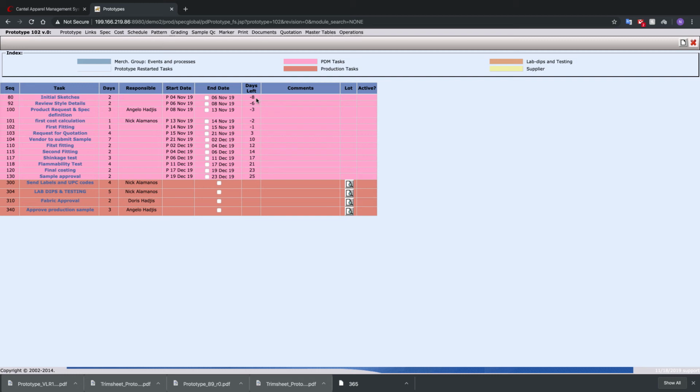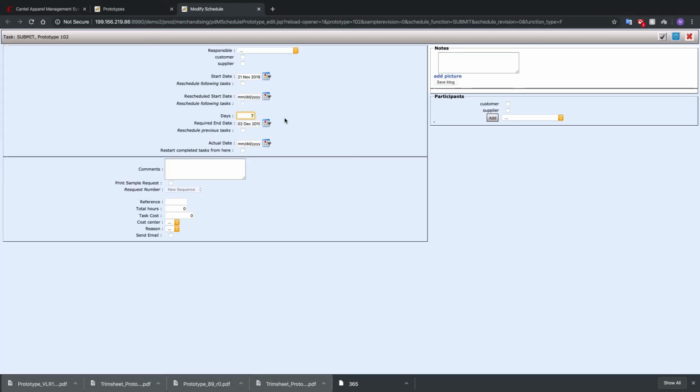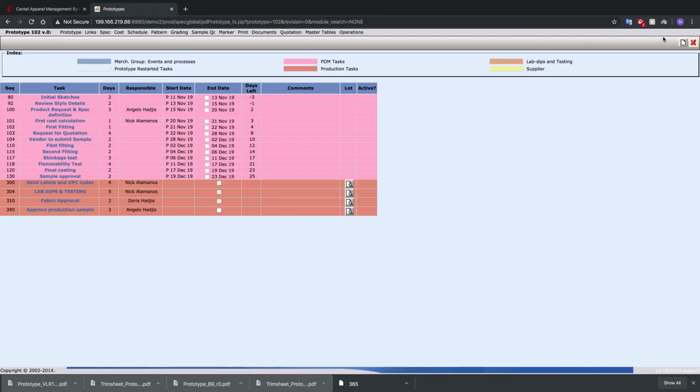Okay, so there's a few things I can do now. I see vendor to submit sample. Let's click on this one. I gave him 7 days to do that. Let me give him 2 days to do that. I know he can do it in 2 days. So let's click on 2 and reschedule the previous tasks based on this new date of 2 days. Okay, not bad. Now we're 3 days behind schedule.